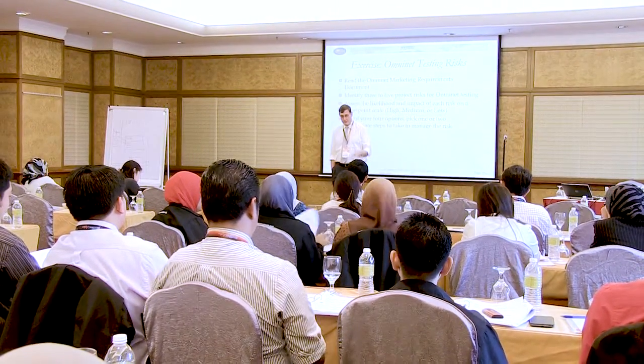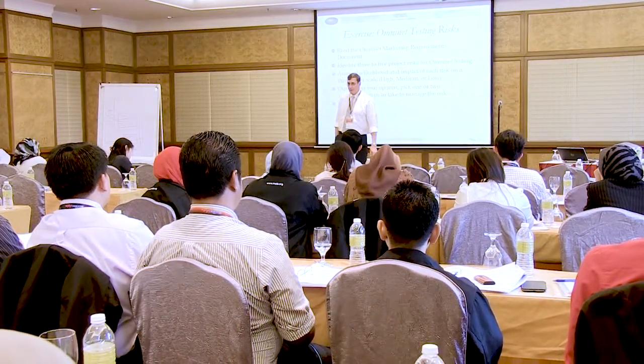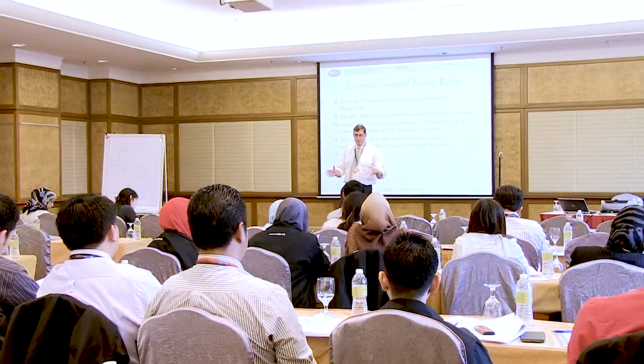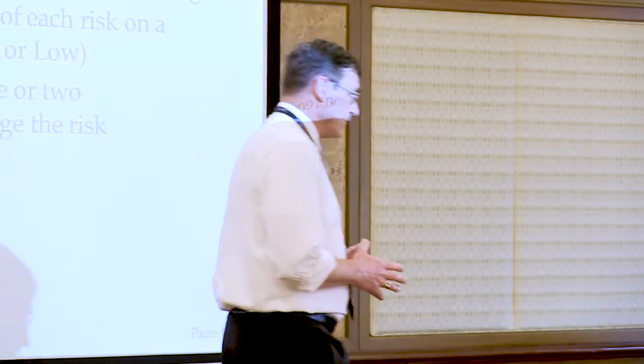You want to avoid getting into a situation where you have 10 pages of risks and mitigations in the end of your test plan, and you spend more effort on mitigation and contingency defining those than you do on the actual testing. Okay? But focus on the most important ones and be ready to deal with those. The rest of them, just accept them.